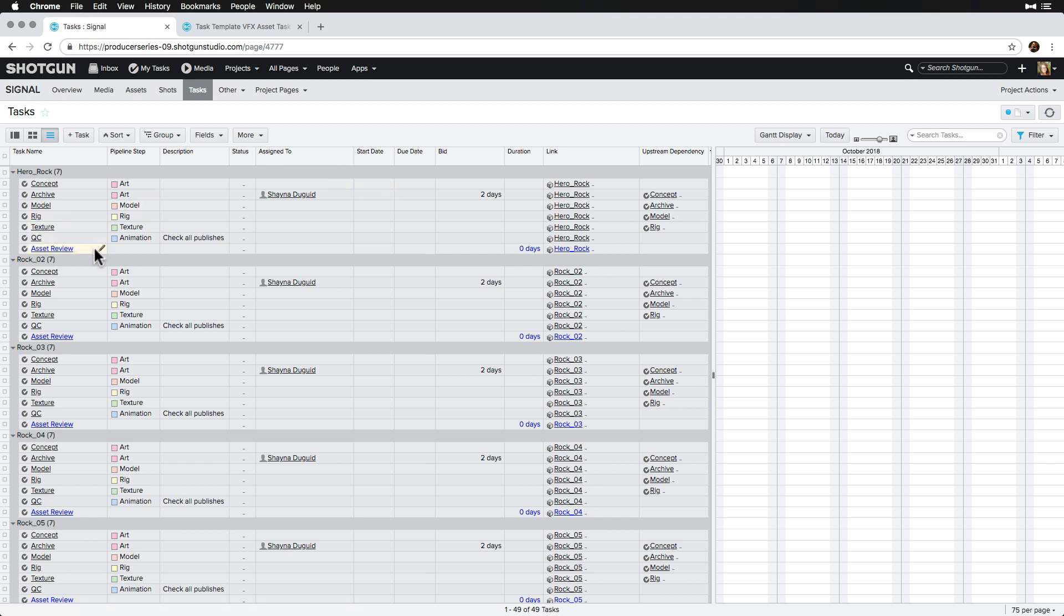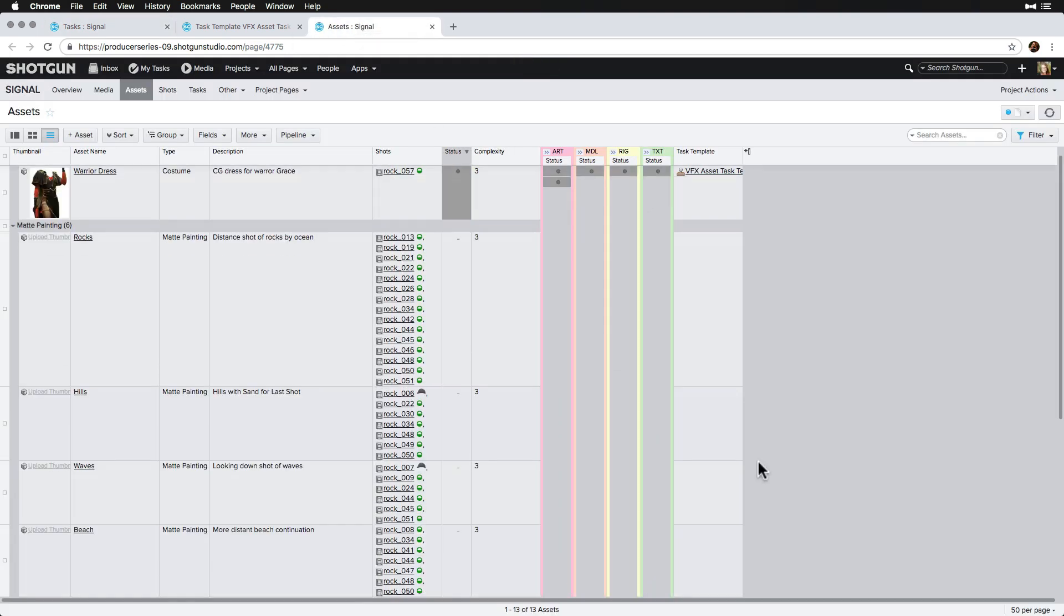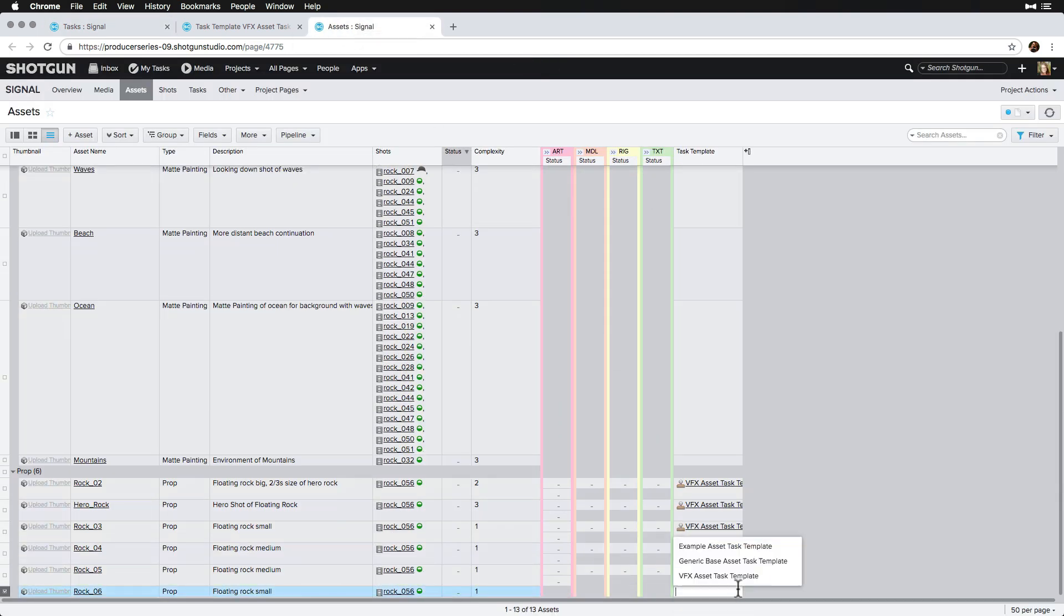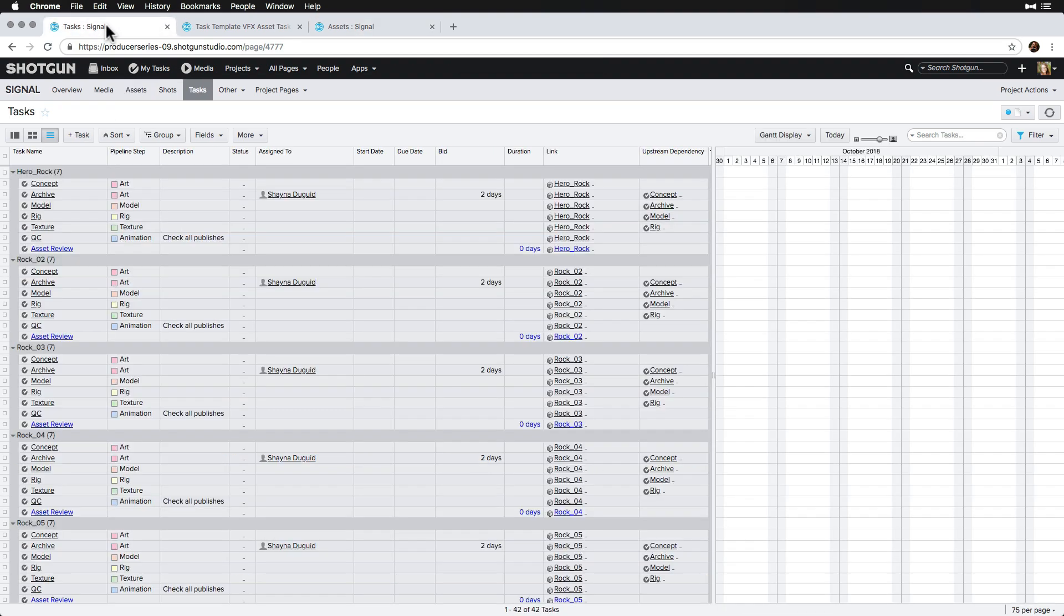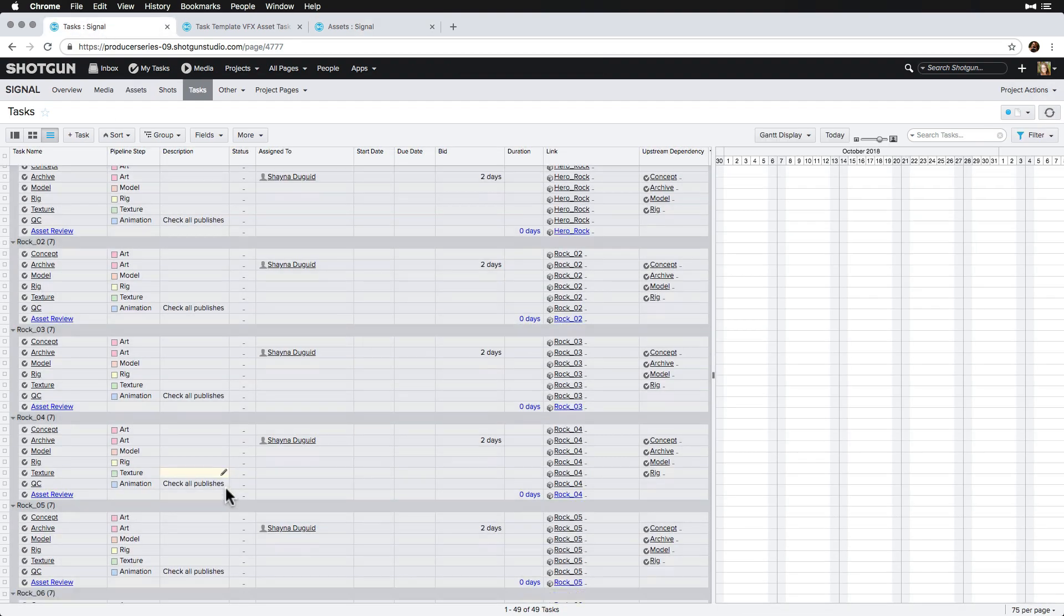We also see that the review milestone we updated on the existing task that was in the task template has not been updated, and that's because the task already existed and that field data will not be overwritten. But, in the future, when we link the task template to assets, that information will be incorporated accordingly.